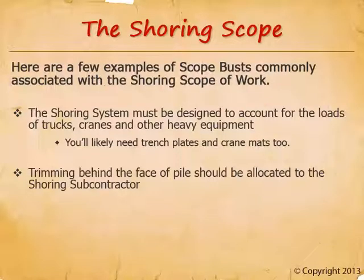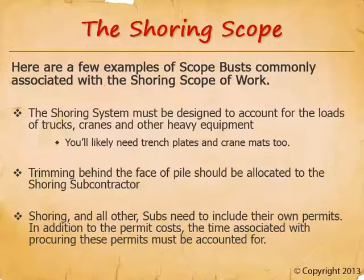Trimming behind the face of pile should always be allocated to the shoring subcontractor — be careful, because they very often try to exclude this work in their bids. The mass excavation subcontractor will excavate to a relatively straight line along the face of piles, but lagging boards are tucked behind the front flange of the piles, and the shoring subcontractor needs to hand-trim for the lagging board installation, typically with handheld pneumatic equipment. All subcontractors, including the shoring sub, need to include procuring and paying for their own permits — not just the cost of the permit, but all interactions with the city. If the general contractor doesn't allocate this work to the subs, they're going to spend a tremendous amount of time waiting in line at the city for each and every deferred permit. The general contractor's time is much better spent managing the project.